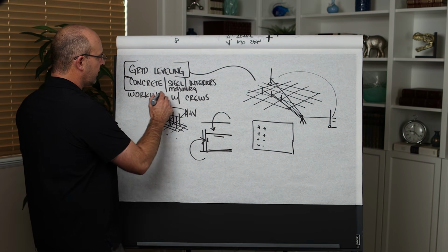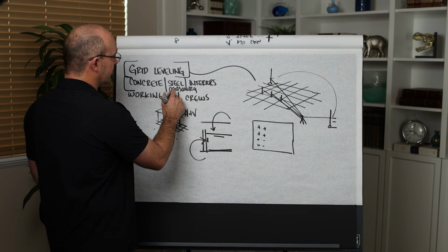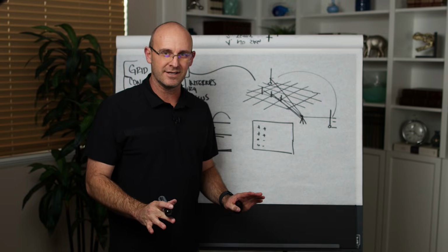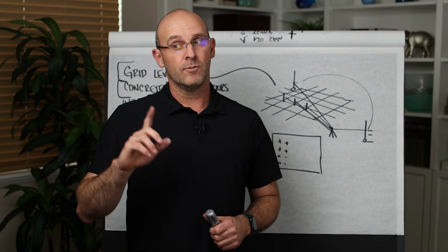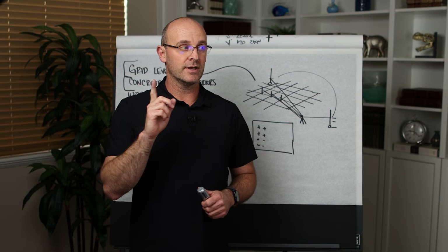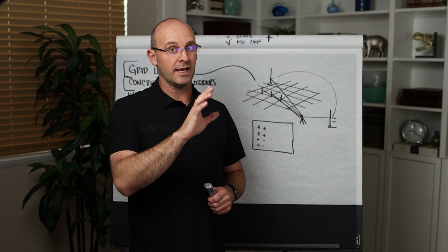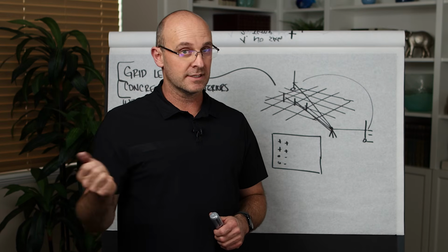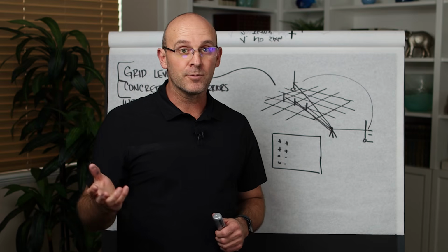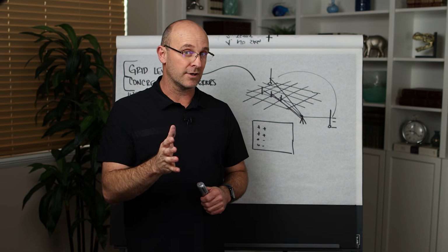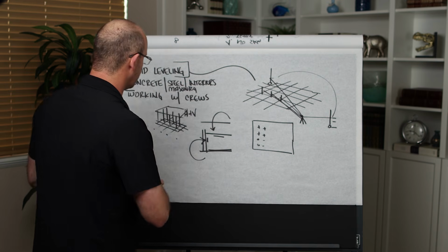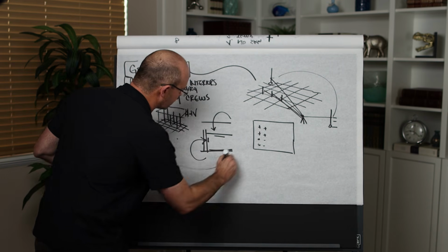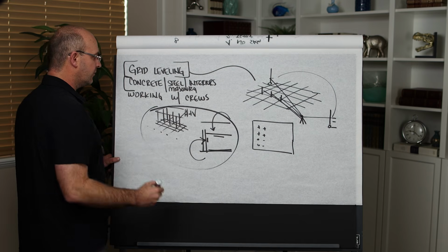So when you're going from concrete to the superstructure, steel and masonry, it could be concrete as well, to interiors, there's always something to check that is hidden. If you think about it, concrete and a wall are not much different. With concrete, it gets hard and gray, and with drywall, it gets soft and white. If it's dense glass, it's yellow, or if it's purple board, it's purple, but it's a different covering, but it's getting covered. So a field engineer, in addition to checking every component, is making sure that we are quality controlling anything that's being covered or hidden.